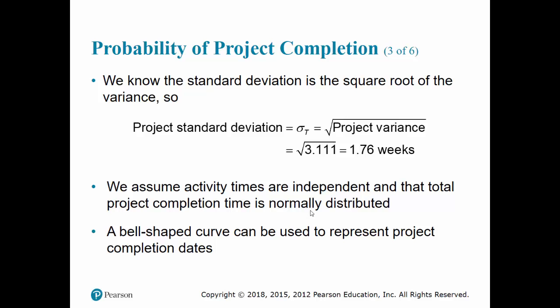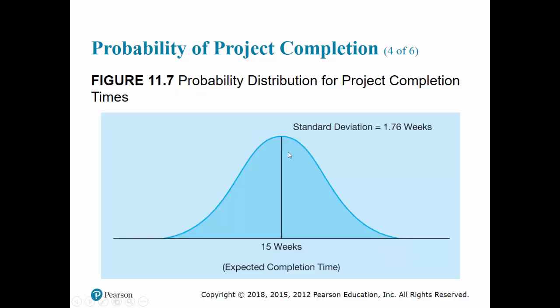And therefore, even for small number of activity times following beta distribution, the sum will be normal. So even for 4 or 5 activities, it will be normal. But in real life project management cases, the critical path will have probably hundreds of activities, so there will be no problem assuming or using normal distribution to compute probability.